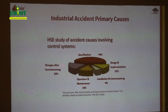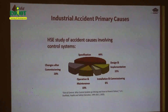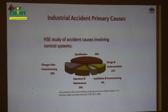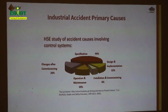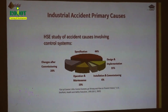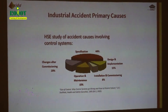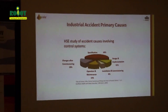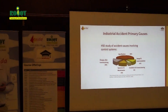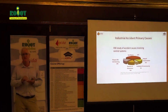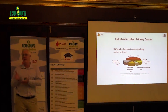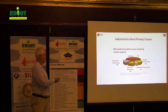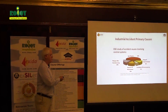The next big cause was changes made during commissioning. I've been involved in commissioning and you watch the maintenance crew and operations people sitting there making a hidden list. As soon as they get handover and control of the clock, they start making changes because they don't like the way it's been designed or implemented.